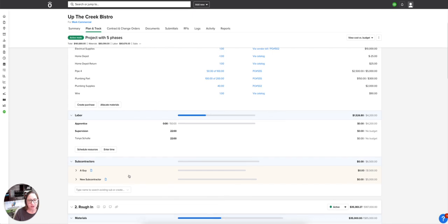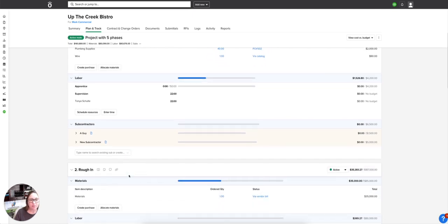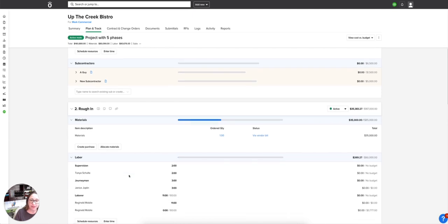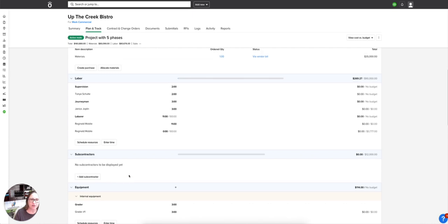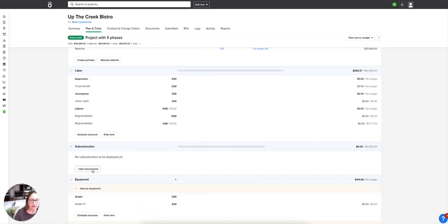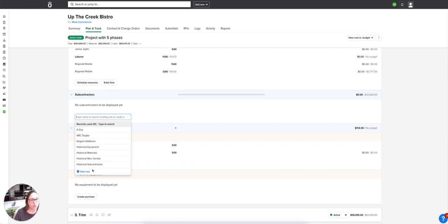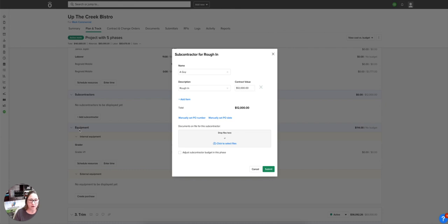Well, subcontractors in Knowify are treated very much like purchase orders, and you can send them to your subs, but they do work a little bit differently. So let's go down to our rough-in phase, and let's go ahead and assign a subcontractor to work on this phase. So I'm going to just go ahead and click Add Subcontractor. I'm going to pick the subcontractor that I am entering into this agreement with. So now this is going to actually set up a subcontract within Knowify for me.